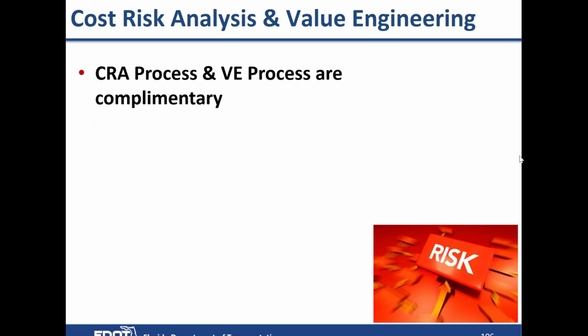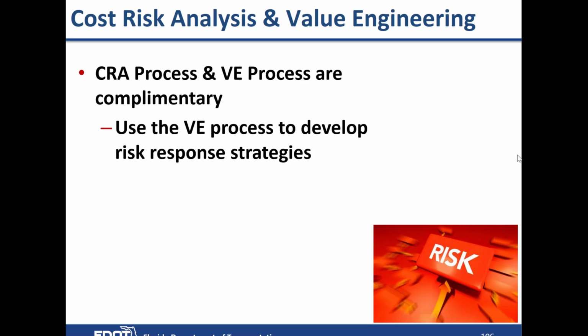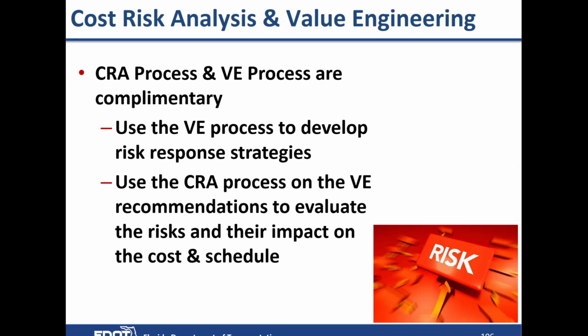So cost risk analysis and value engineering, this is something that's been popular in the last year or so. And they can be complementary to each other. So you can use a VE process to develop risk response strategies, like mitigation strategies, for the risks that were identified in the cost risk analysis workshop.